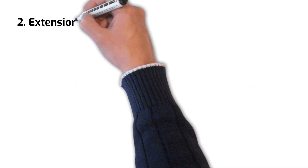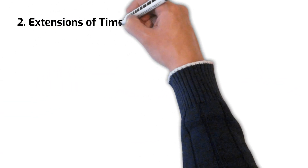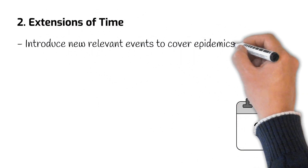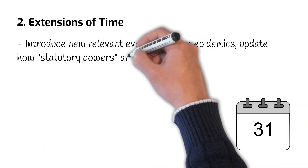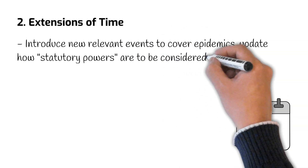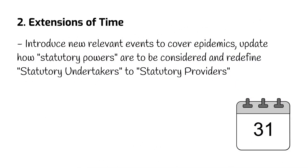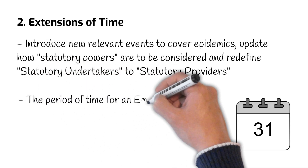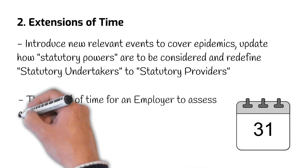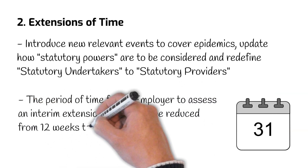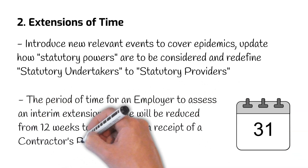Number 2: Extensions of Time. The 2024 edition of JCT will introduce new relevant events to cover epidemics, update how statutory powers should be considered, and redefine statutory undertakers to statutory providers. In addition, the period of time for an employer to assess an interim extension of time will be reduced from 12 weeks to 8 weeks from receipt of contractors' particulars.